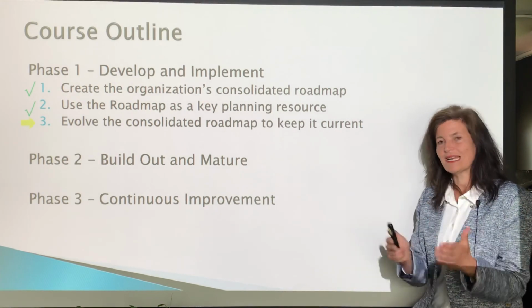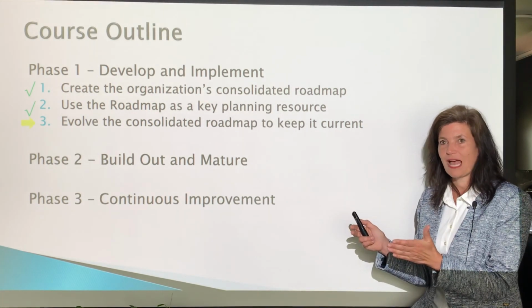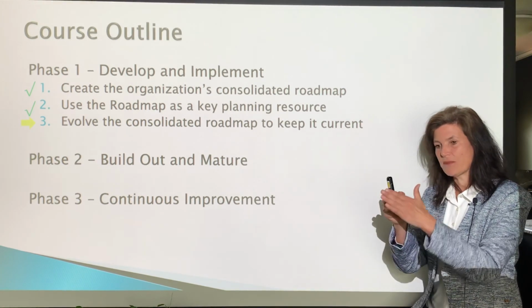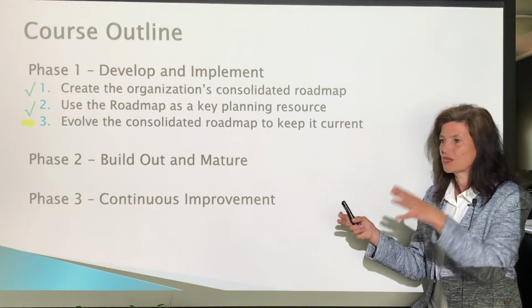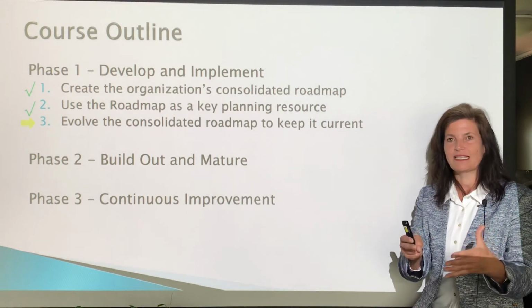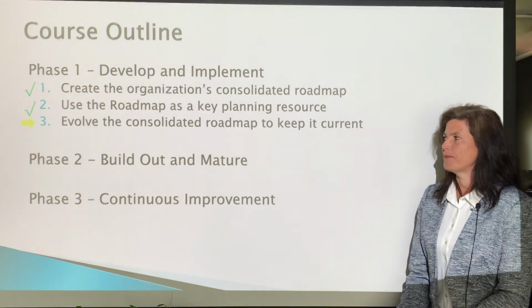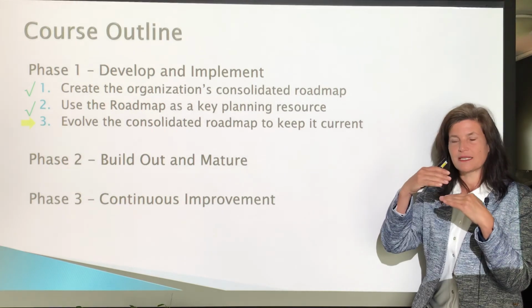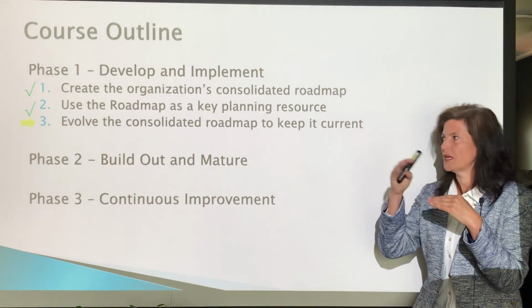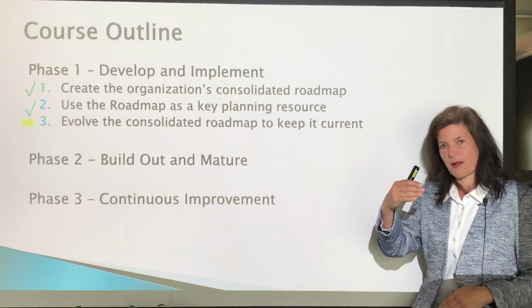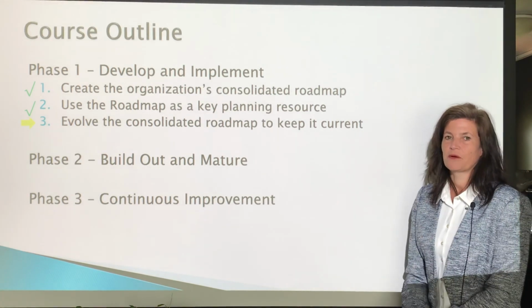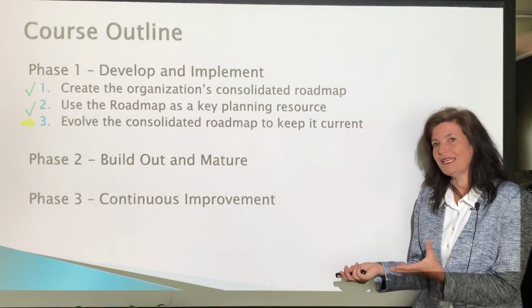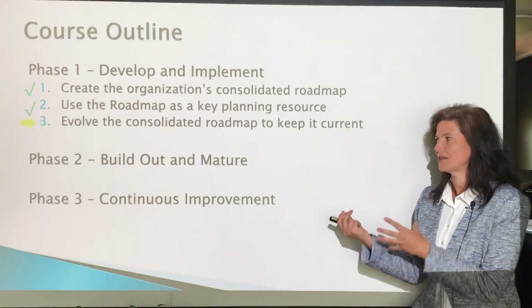We're creating an implementation plan, and the implementation plan is usually for a 3-6 month period. We show how we pull the activities off and we do them. We show how we possibly are adding more activities and we're breaking them apart. And then once we implement them, we take them off the roadmap. So the roadmap does get smaller. But then what's going to happen is once we go into the next year, we're going to probably add more items for what we want to do. And it's just this continual cycle. So we're basically doing EA on the EA practice as well as on the organization.